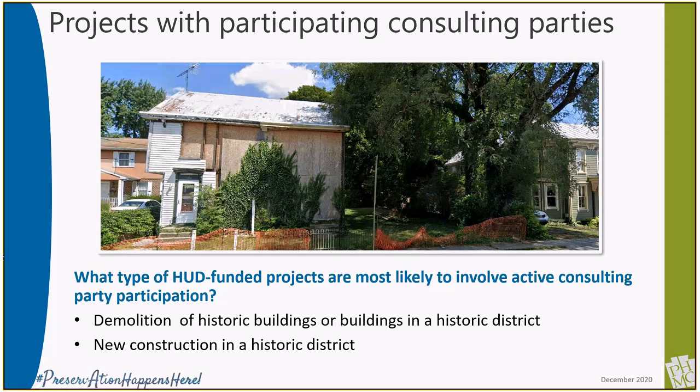Both consulting parties issued letters or emails stating their positions or concerns, but did not choose to participate in meetings with the federal agency, local municipality, and SHPO. Mitigation for the adverse effect included consulting party review of the final design of the new construction and sharing of the National Register nomination form for the historic district with the Historical Society for posting on their website. The needs of all parties were considered, and reaching resolution and outcome was satisfactory to all participants.